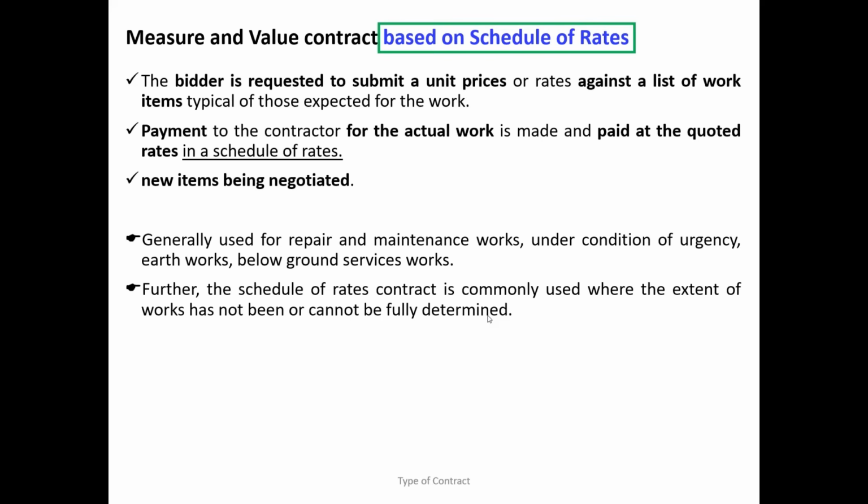If the work happens, you will do it, and you get paid as per the rate agreed. For any emergency work, do we have time to define the scope of work? No, right? Any earthwork below the ground, you'll go for a measure and value contract. Okay, so these are the reasons for the measure and value contract, standing on the schedule of rate.